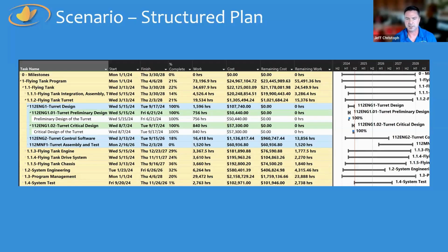So I have one task inside each work package. So my structure is I have a high level WBS, then I have control accounts, work packages, and tasks. Those tasks are resource loaded. And my use case is variance analysis.